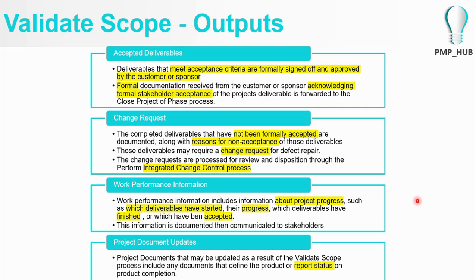And you can say that we had 10 change requests. 2 of them are chargeable, 3 of them are our issues. There are some bugs, so we are changing them internally. Our understanding was not correct, so you are going to trade it off between your customer and you. So there is a lot of work information that is getting delivered at this process that can be used in stakeholder communications when you're communicating to your stakeholders.